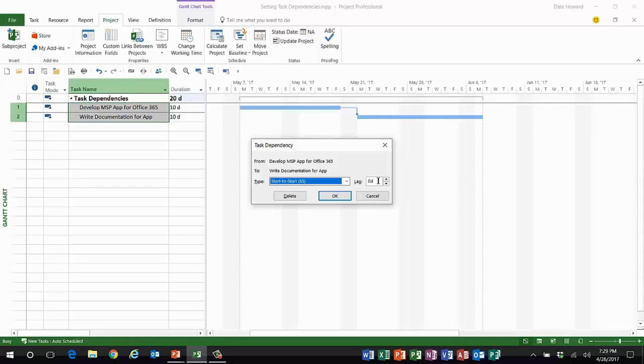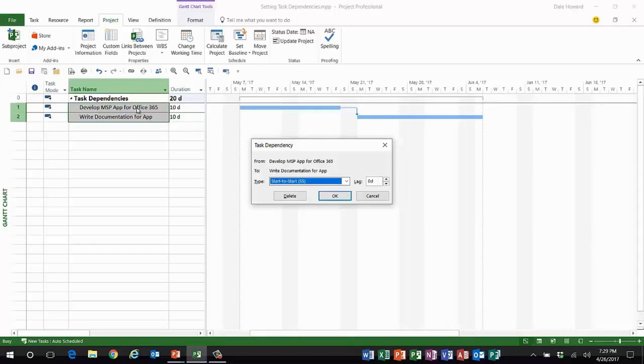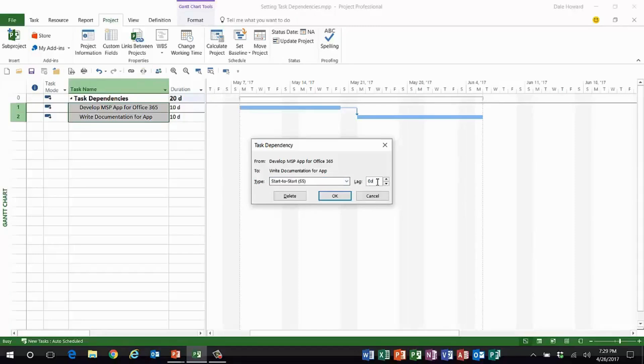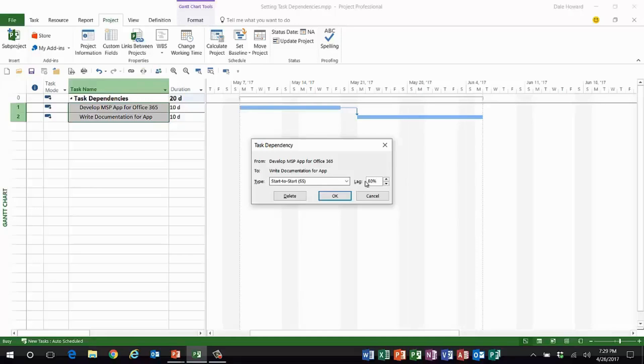But here's what you may not know: the dependency relationship again is we're going to start developing the app, when we're 80% done we're going to start writing the documentation. What that means is start to start as the basic dependency type, but the lag I'm going to type is the number 80%. You can enter lag values as either a time unit such as days or as a percentage of the duration of the predecessor task.